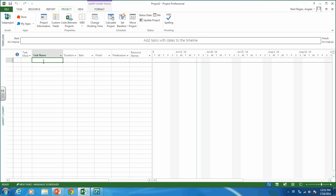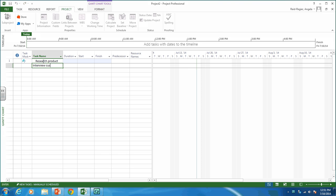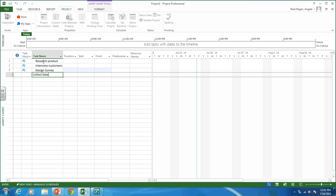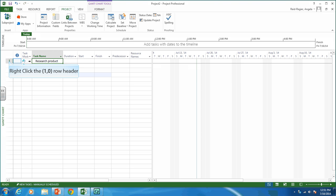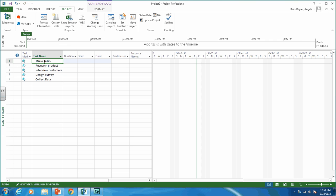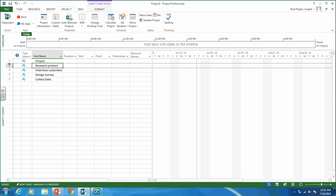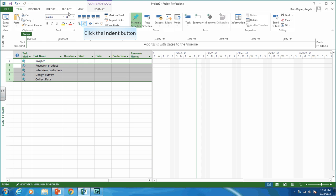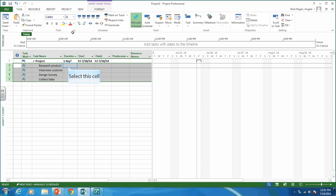We have four activities to enter: research product, interview customers, design survey, and collect data. You should also enter a parent activity — a summary activity for the entire project. I'll call it 'project.' Because it's a summary activity and I want all the other activities as children of it, I'm going to indent those so that 'project' shows as a summary activity.